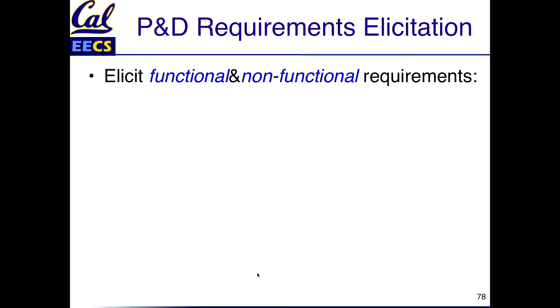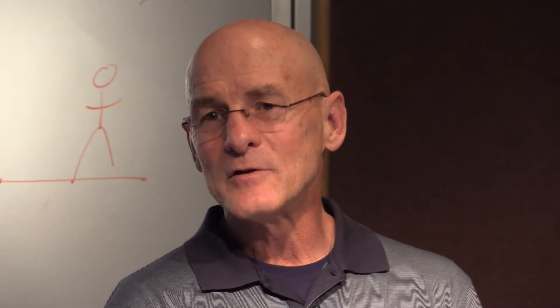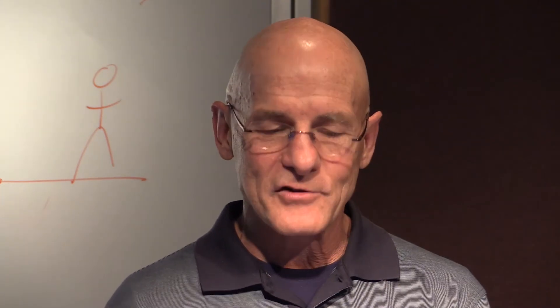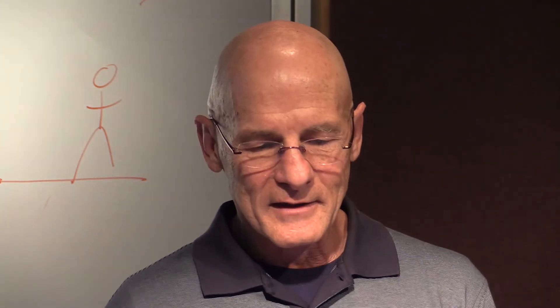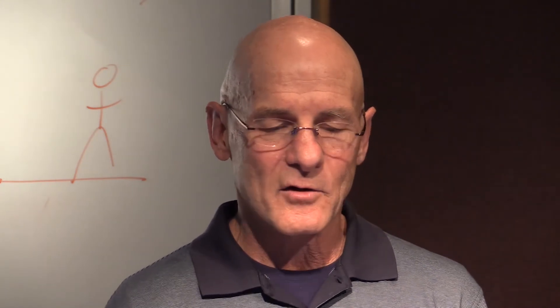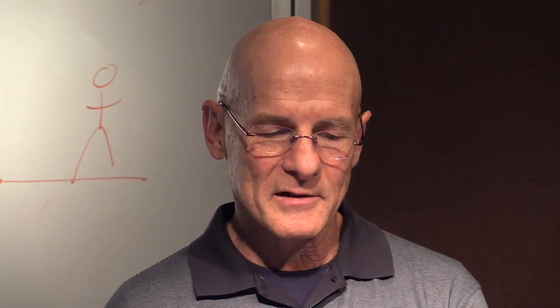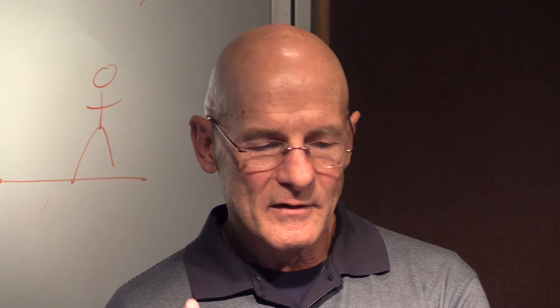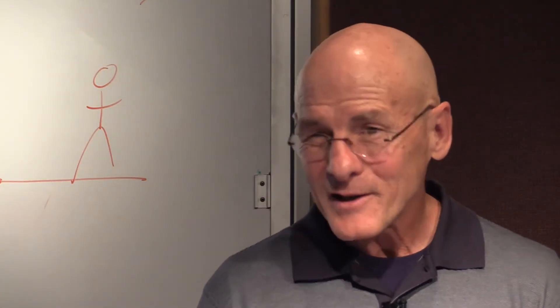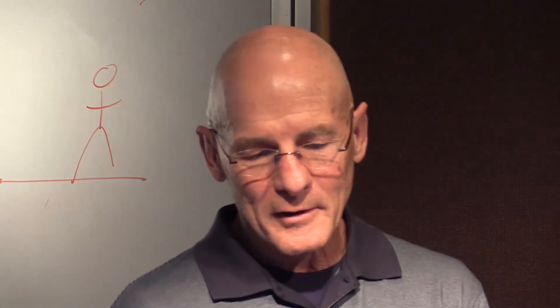You're looking for both functional and non-functional requirements. Functional is like: add a movie to the database. Non-functional is about performance — it's not features; it should be non-feature. Non-functional means 99% response time less than a second, or four nines of dependability. How do you elicit those things? It has to come from the customer, so it's primarily the project manager doing this.